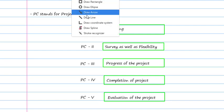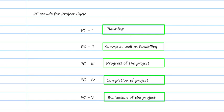These are the five phases you need to remember, as you may get questions based on them. For example, you might be asked: what is PC3, and what do we do in PC3 — is it planning, surveying, completion, or progress of the project? The answer is progress of the project. PC4 is completion of the project and PC5 is evaluation of the project, whether it is a building project or infrastructure project.